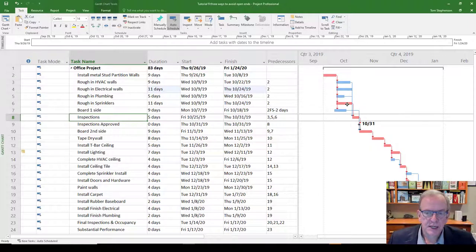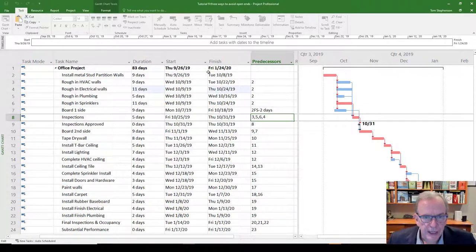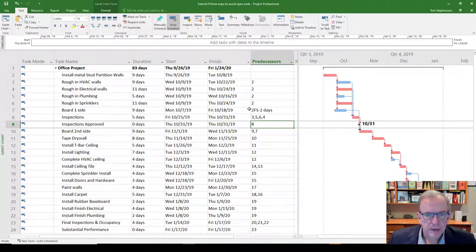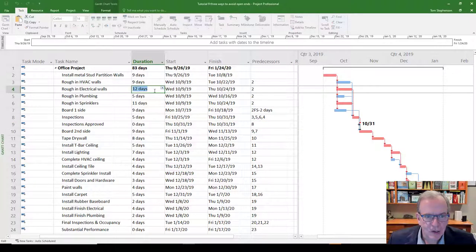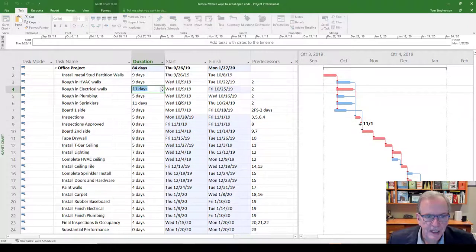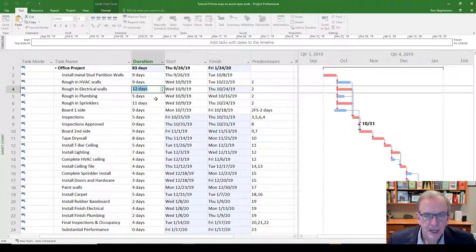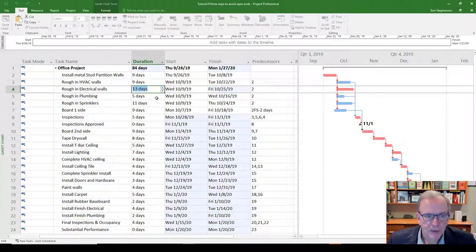In this case you'd want it linked to the proper succeeding activity — inspections. So I'll add a predecessor reference here. Watch the finish date: currently January 24th. If I make this activity longer, now it's critical by itself. Two critical paths means if either one takes longer, the whole project takes longer.